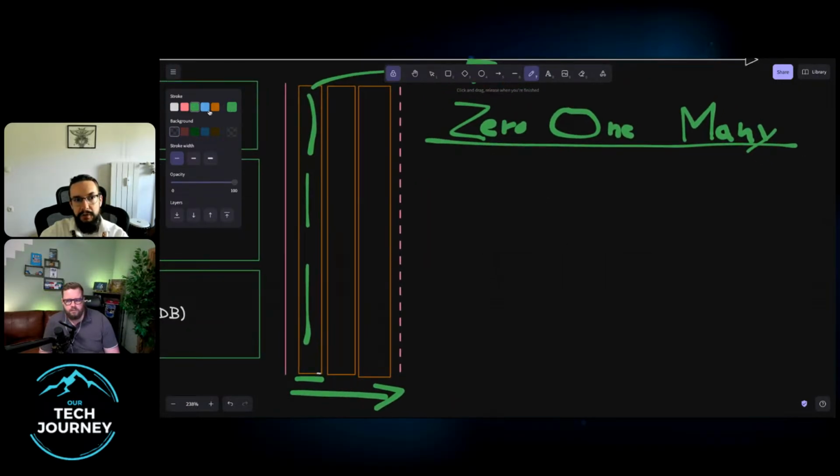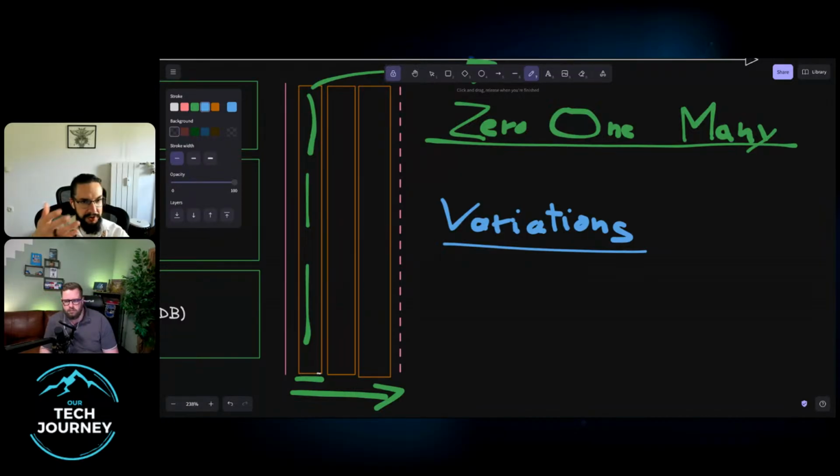Another strategy is figuring out how you want it released, right? So it might be working with variations. Variations usually happen when one of the layers is constrained. For example, ChatGPT is a good example, right? So the UI layer is very constrained, and the variations are coming from the data. This also happens when there's variations in processing. For example, an order processing system or a checkout system will have the same UI, but the variations are coming from how you're doing tax calculations.